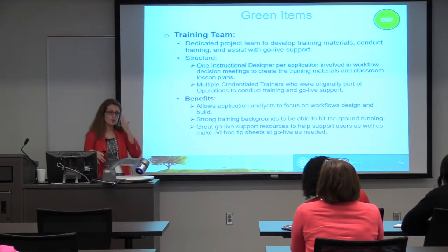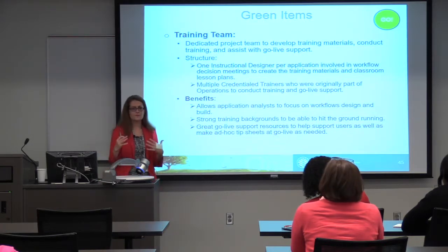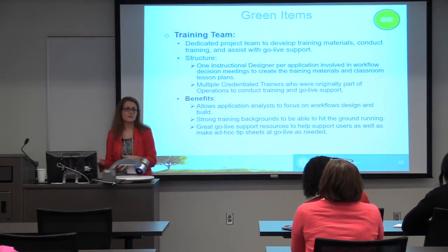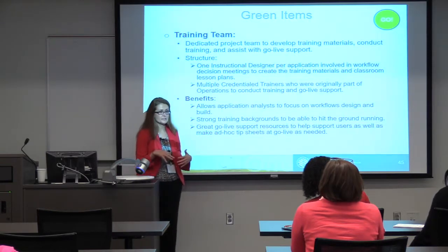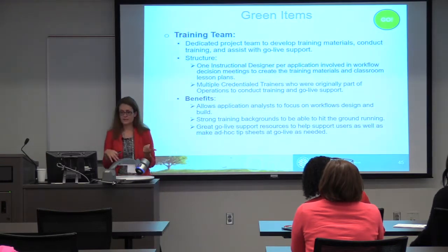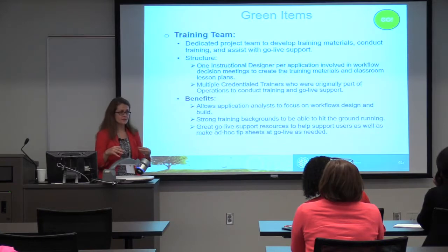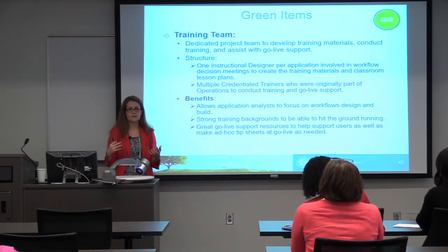And really, they were in the trenches with our analysts in terms of designing the workflows. So they sat in all the meetings and heard everything that was going on, so then they could walk away and go develop the training materials. And we also had credentialed trainers who came from operations to help us conduct our training and also support us at Go Live.